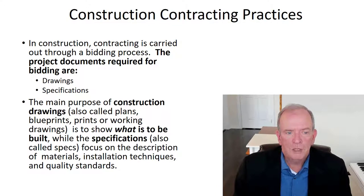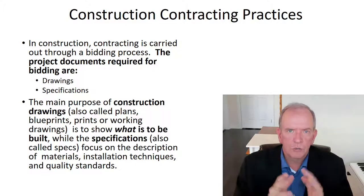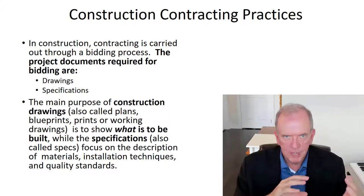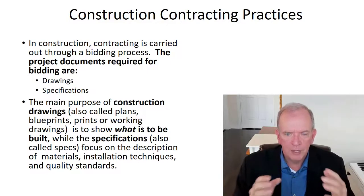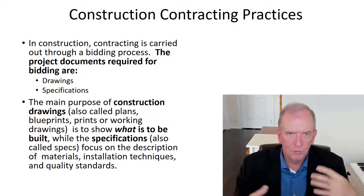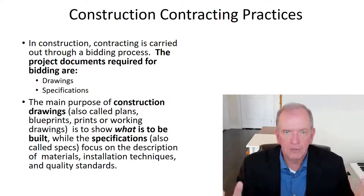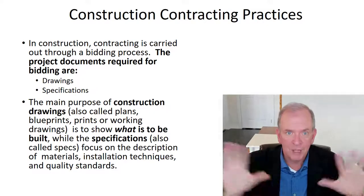The plans and blueprints show what is to be built, and the specifications give the focus and description of materials, installations, tolerances, and quality standards. They complement each other — one is not meant to repeat the information of the other. You don't want to have things in two places trying to do the same thing, because that's where one might get changed and you'll have errors. The specifications ensure that drawings aren't filled with unreadable text.